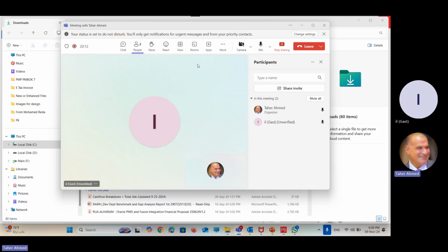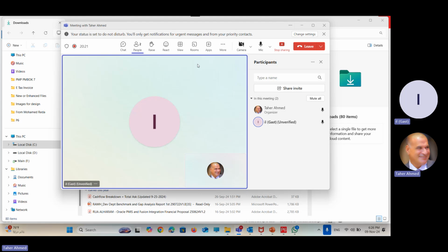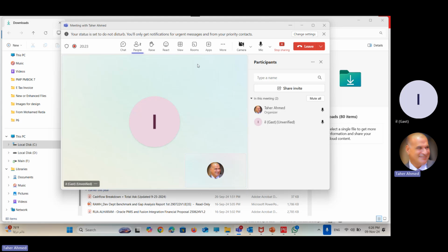We specialized in infrastructure. Infrastructure projects are almost the same, with the same activities but different location names. So I don't have to create the project from scratch. I will copy a project from the old database, paste it, and then modify the information. Those are the 3 ways of adding a project.